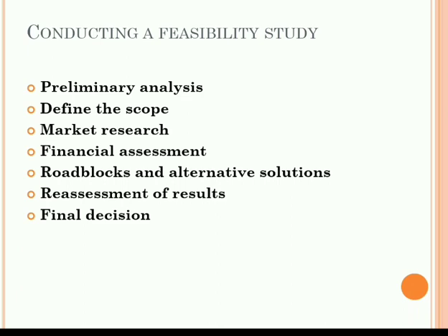Next, the second step is defining a scope, which means we have to prepare a project income statement here. This step requires one to work backward. We have to start with what the income from the project is expected to be, and then what project funding is needed to achieve that goal. This is the foundation of an income statement. Things to take into account here include what services are required and how much they will cost, and any adjustments to revenue such as reimbursements and others.